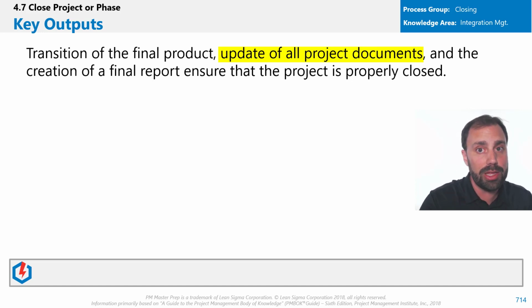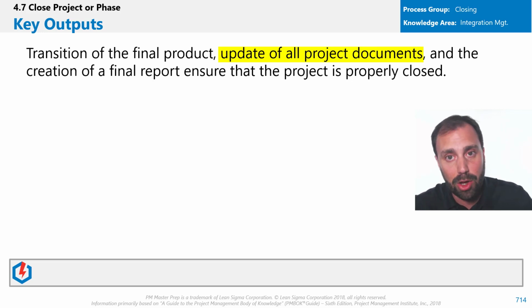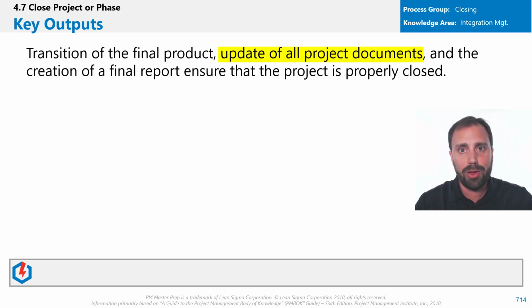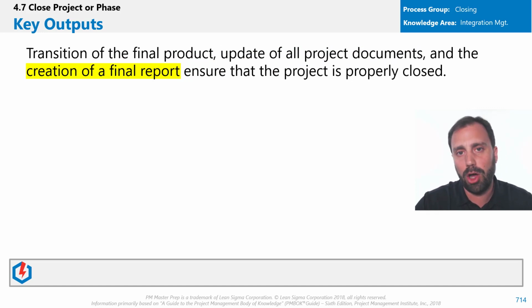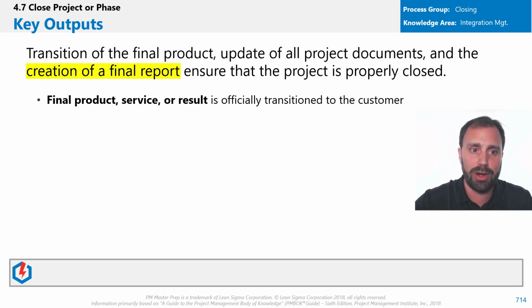We want to start that early in the project, not just now, but now we go and talk to everybody. Hey, what'd you like? What worked? What didn't work? What did we learn? We compile that. We put it in the database, right? And then the final report summarizes everything: cost, performance, where we are now, lessons learned, the product, how it was delivered, all these things, so we can properly close it. So we create that final report.